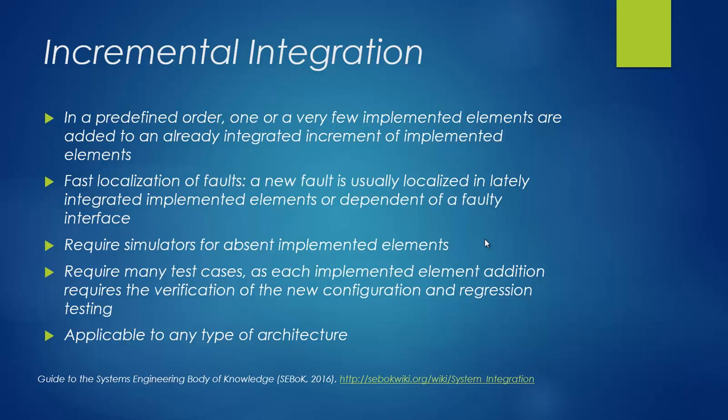This integration technique requires simulators for absent implemented elements until they're present. Every time a new element or elements are added, the system must be tested and verified to make sure that the new configuration of the system is working as intended. This technique can be applied to any type of systems architecture.